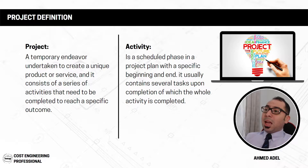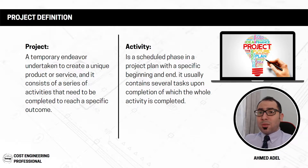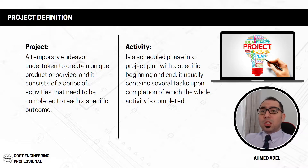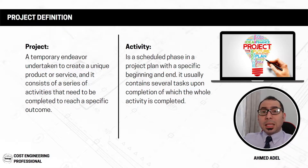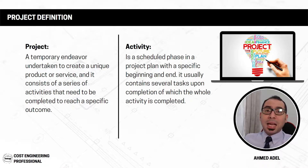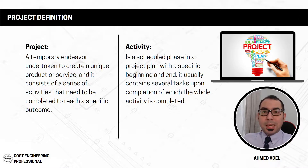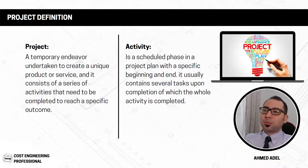An activity is a scheduled phase in a project with a specific beginning and end. It usually contains several tasks, upon completion of which the whole activity is completed. So an activity is part of the project, the activity consists of smaller tasks, and if you finish those tasks you finish the activity. Let me give you a small example — let's say we have an activity called 'formwork for first floor slab.'